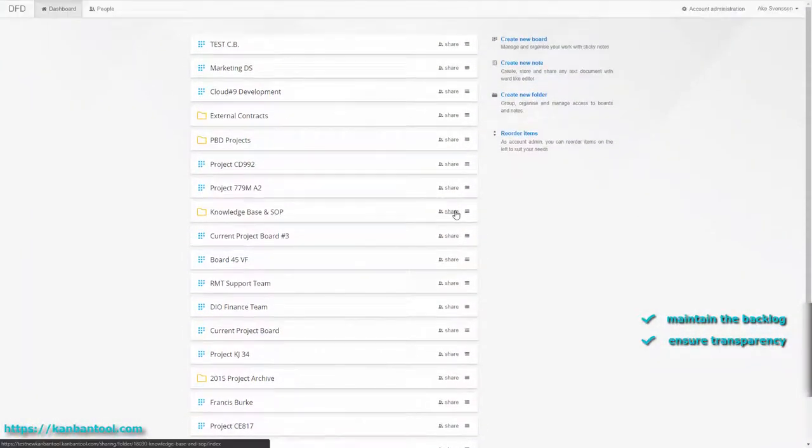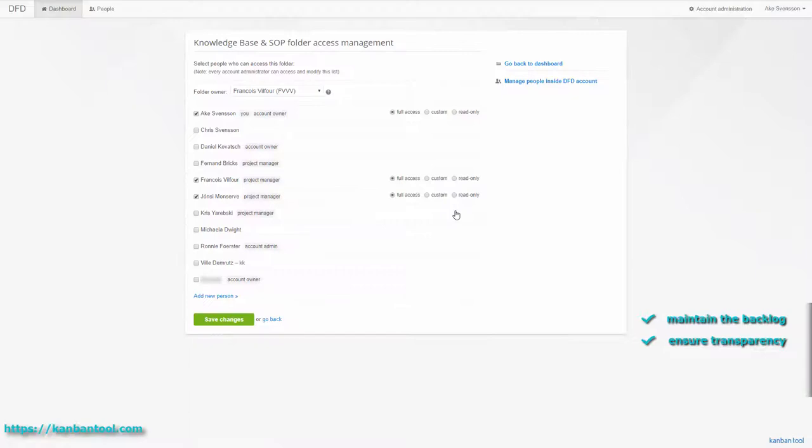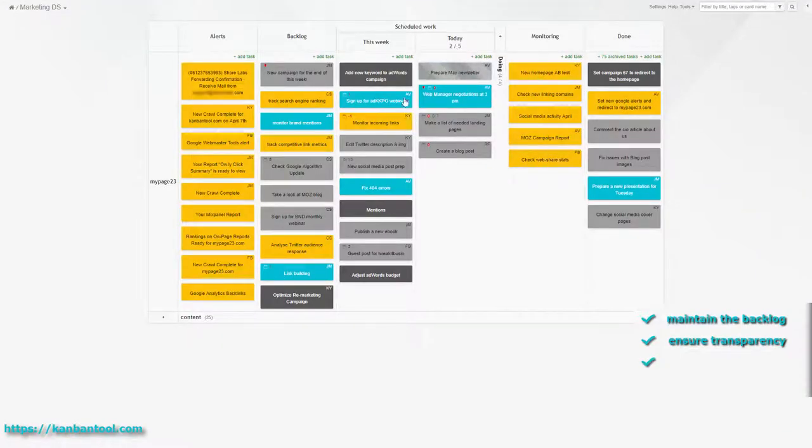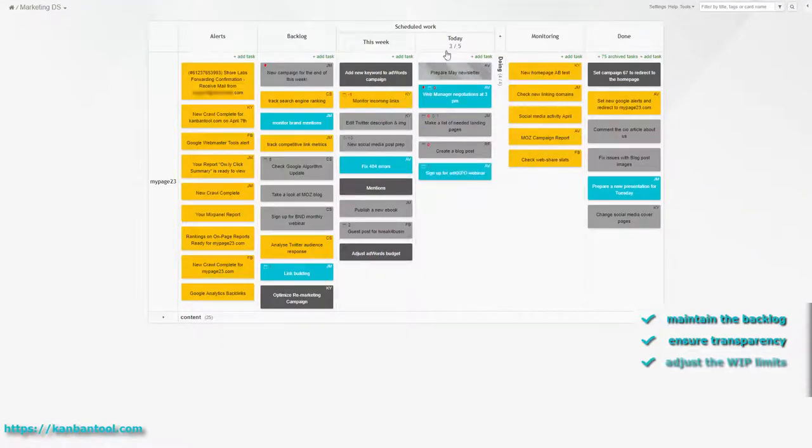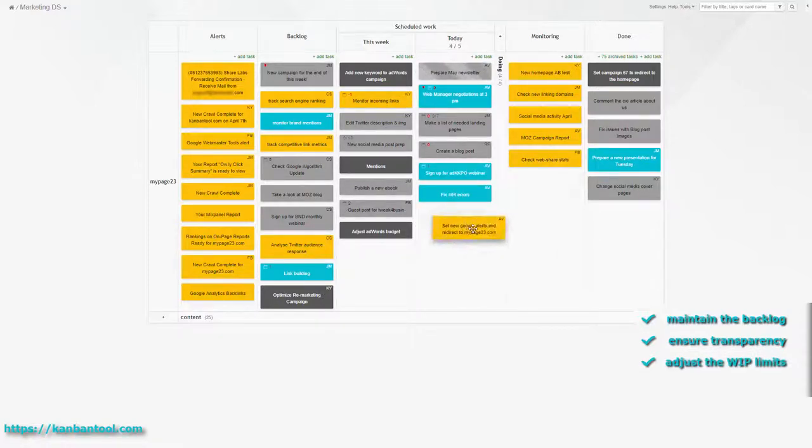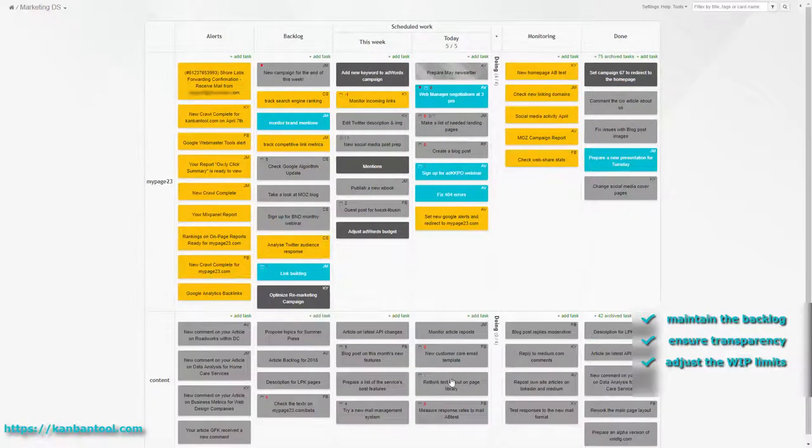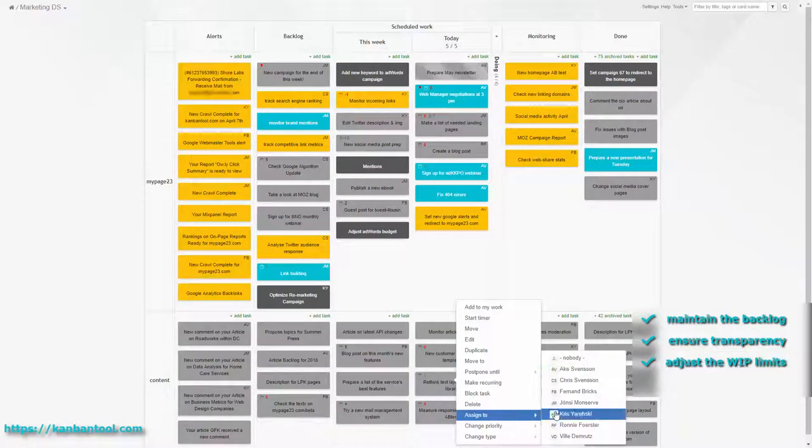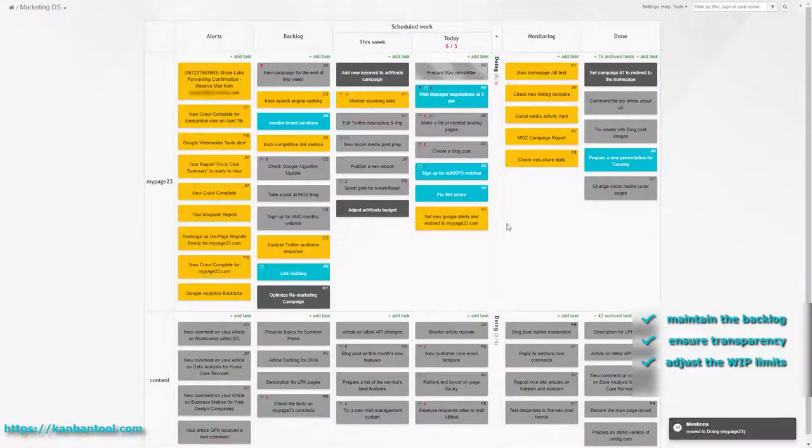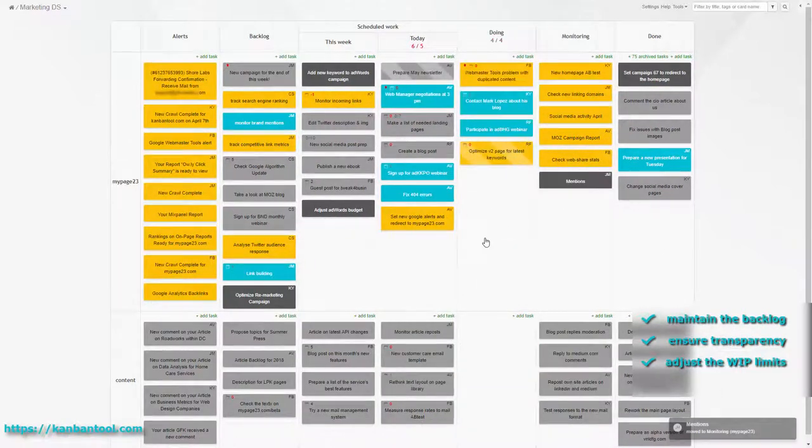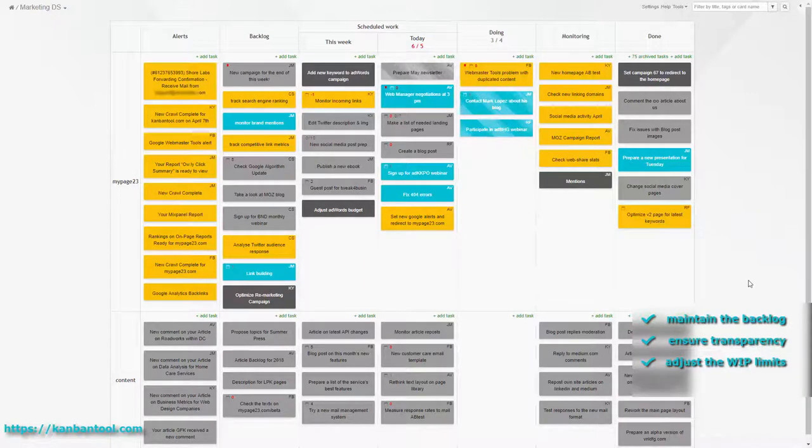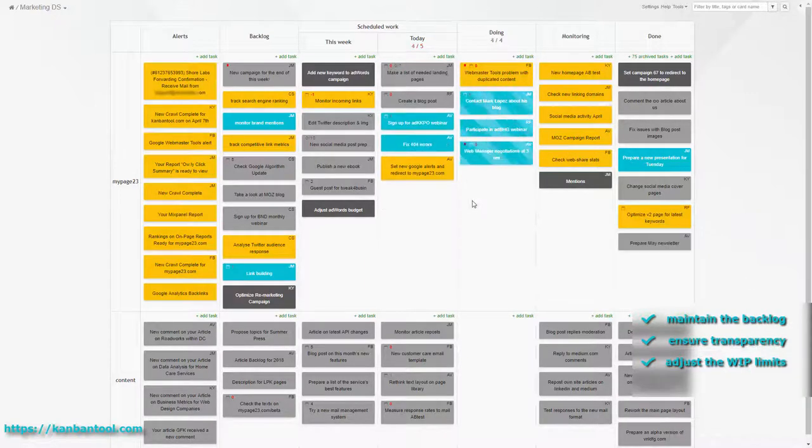In Kanban Tool, you decide who can access which boards. The WIP limit will be different depending on the kind of work the team does. It's most sensible to set the limit so that people can get through the backlog items without it getting overloaded. It's easy to get a feel for what this number should be after a few initial weeks.